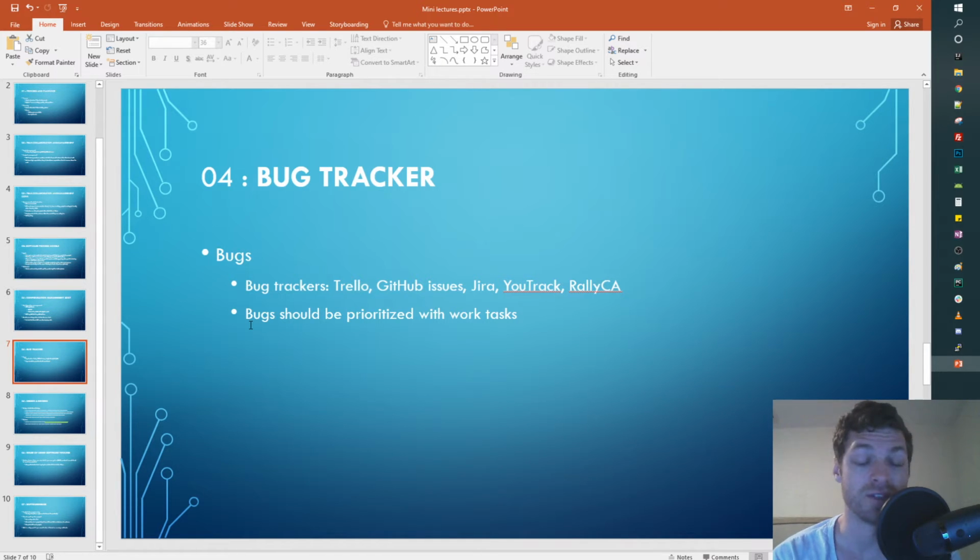which is actually a really nice thing, especially when you want to see, well, this feature, what did we actually do on this feature? If you don't link those changes up to those issues, it can be really challenging to know, well, this thing took 5 weeks, but what did you actually do for it? So linking up those changes to those bug trackers is really nice. There's another tool called Jira, which is a pretty popular tool out there by Atlassian. Very similar, and you can link it up to GitHub, GitLab.